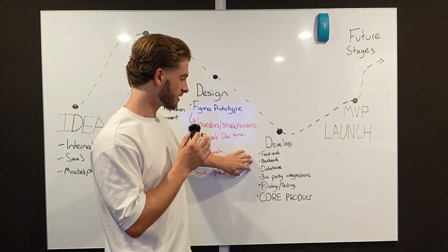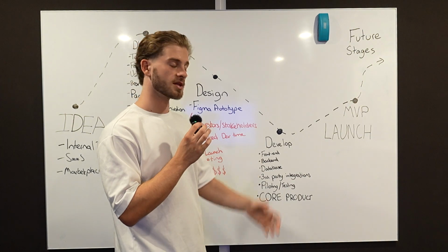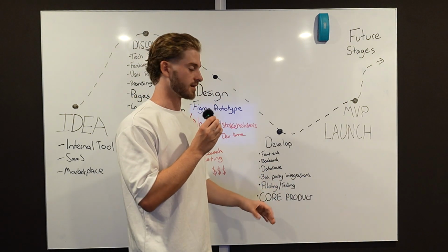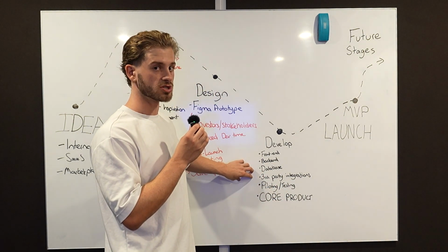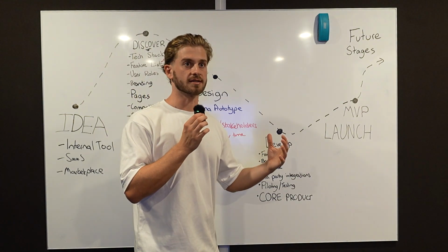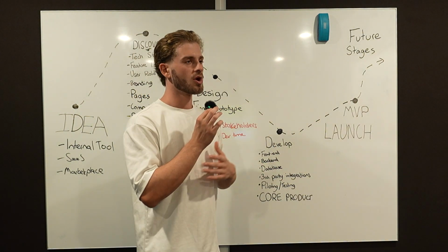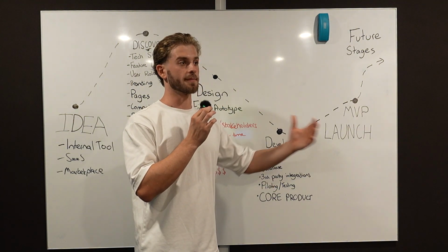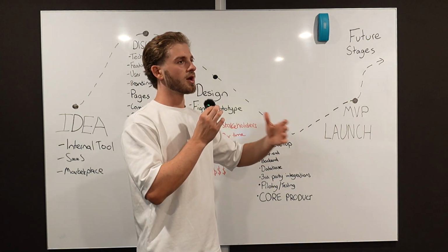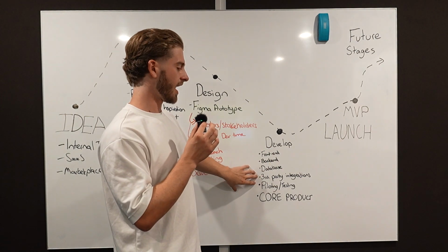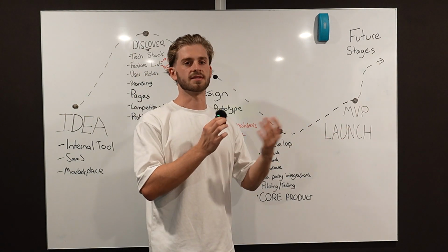Now, from our experience, when we quote out a project, the things that we look at that tend to drive your prices up are how many third-party integrations are you working with? The reason for that is to connect to other services. Not only do we have to set up those API connections, we also have to get familiar with the API that third party exposes. And then there's all sorts of issues that could happen from their side that we need to take into account.